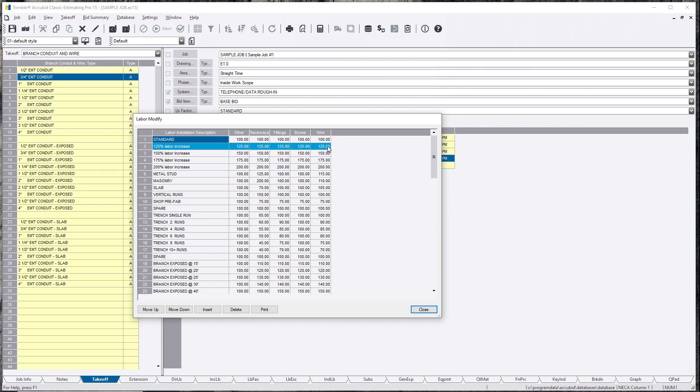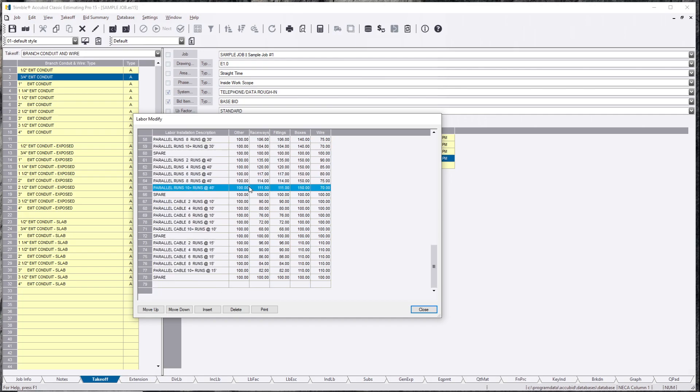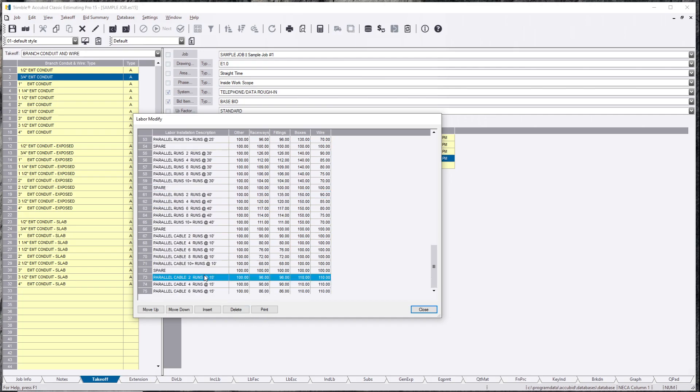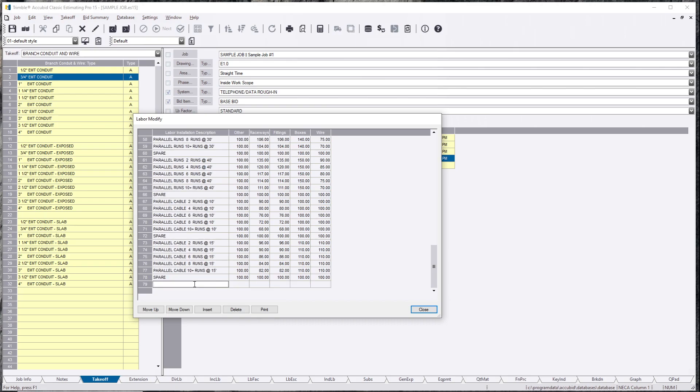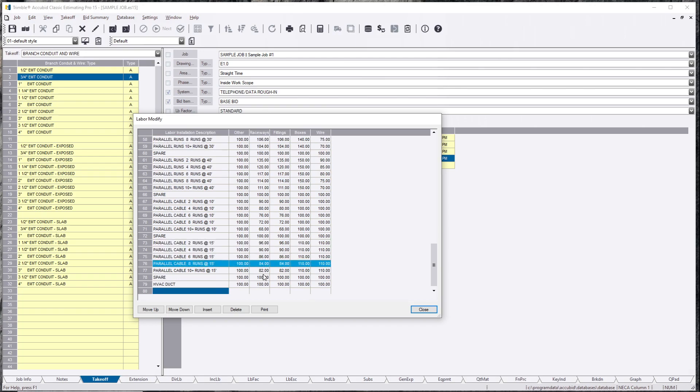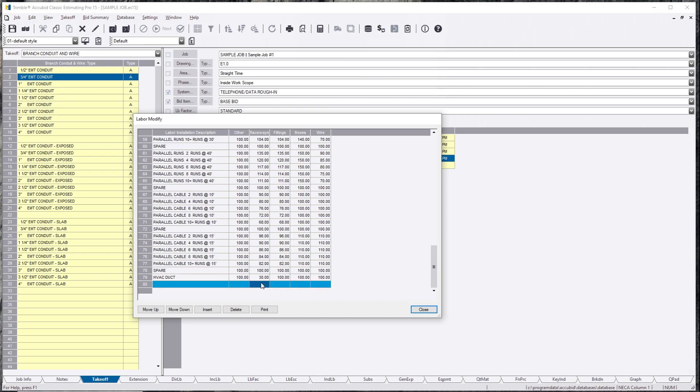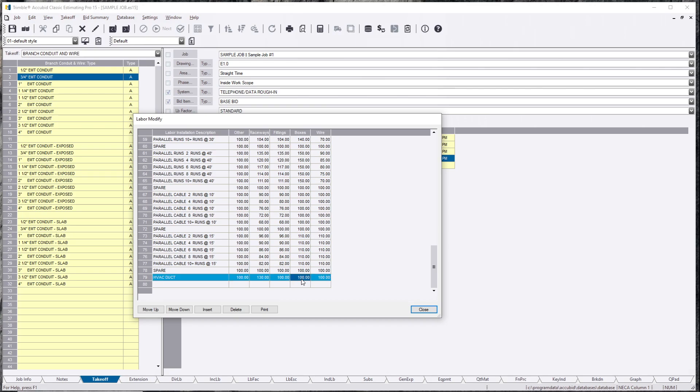You can create your own, you can take any one of these, you can keep adding new ones, whatever you want to do. So let's say we have a particular hallway and that hallway has a 48-inch duct that's 36 inches high, it's taken up almost the whole corridor. So we're just going to call it HVAC duct. It's going to default everything at 100 percent. We're going to say our raceways are going to take 130 percent, so we're adding 30 percent on top of what it normally is.